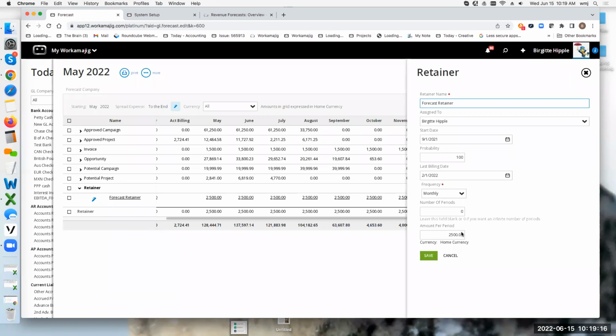That's fixed fee. Billing schedule still bills the same amount every single month. Scheduled invoice says, I already created the invoice the way I need it to look, with all these specific line subjects and the way the detail is set up, and posting to these different GL accounts, income accounts, and that's the way I want it created every single time. I don't want to have to reinvent the wheel every time the invoice gets created and make these changes. Let me just go ahead and create an invoice and schedule it. As long as the scheduled invoice has the project numbers on it, it's still billing the individual project.